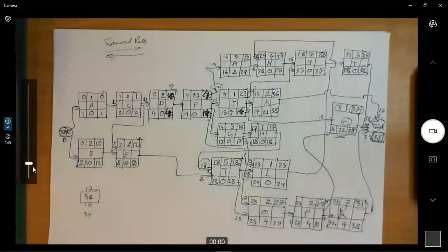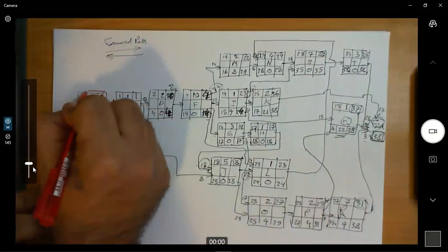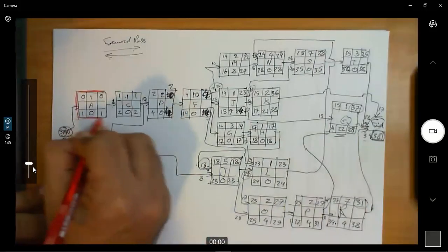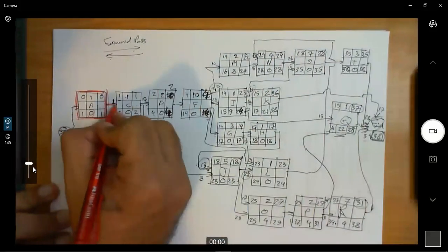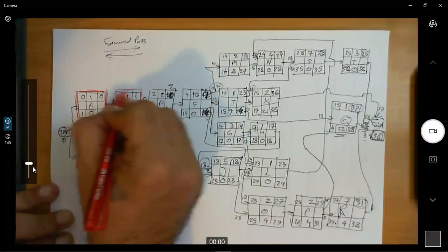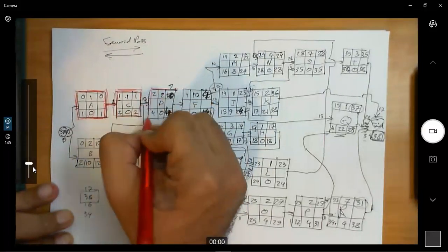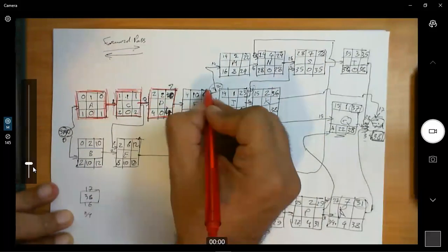Okay, where are the critical activities? The activities with a floating time of 0. Those don't have any chance of delaying their start. So A, then from A we go to C. Then we go to D, then we go to F.